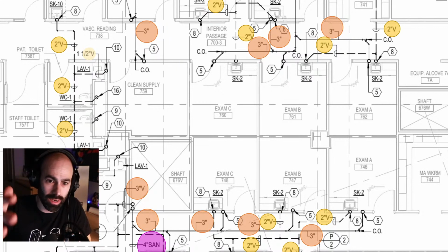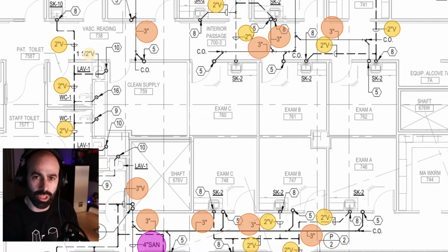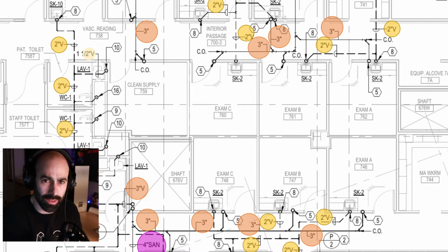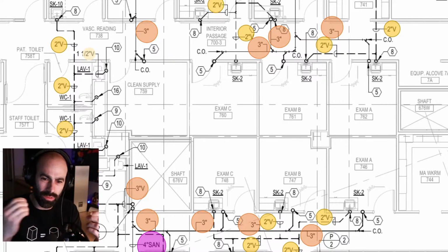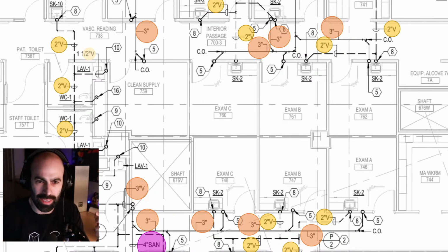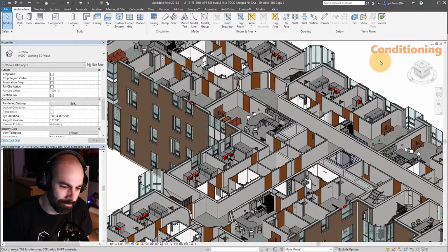These are annotated notes over a 3D model. If I was to do this takeoff and hand over an Excel sheet to my estimator, it'll say, hey, we've got 2,000 linear feet of 2 inch pipe. But then you look at the plans and you're like, well, where's all the 3 and 4 inch pipe, right? That's where the visual connection is huge. Being able to select in your takeoff and see, wait a minute, something's fishy here. That is also powerful, being able to tell why the data is not looking correct.